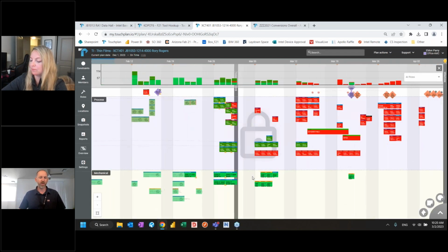We can run reports. On this job, there's a lot of volatility due to supply chain and a myriad of other things that can impede progress. To avoid having guys in areas where there's not executable work, and therefore inefficient execution of time and cost, we run what we call a make-ready report, but it's not quite directly the lean make-ready report. It's a list of all the tasks that can be executed if we put bodies in those areas. Red is simply something the team knows has executable items that need to be completed before it can become ready